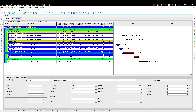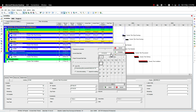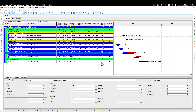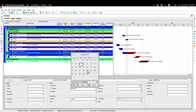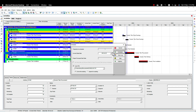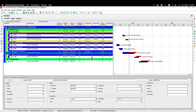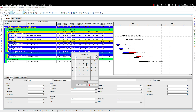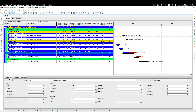So I update it to end of October and the percentage is updated automatically. For the second update, still on 1st October, I ask the same question. They say manufacturing has moved by one day and they expect completion by 1st November — so I simply update the forecast finish date to 1st November. For a third update, if it is an important activity, I ask the same question — you might not have enough information every week, so you may update only every two weeks. Let's say we're expecting one week of delay, so I update it to 6th November and the actual percentage updates automatically.